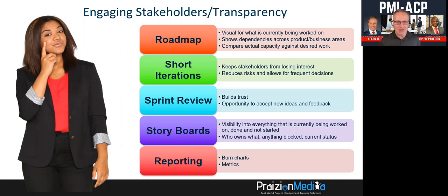Fantastic. And that ties us to the sprint review, which is the demonstration of the output of that short iteration, right? So this is how we can keep our stakeholders engaged, keep them involved in the process. We need their feedback. Here's what you're going to have often, especially in waterfall environments. You're going to have stakeholders that say, I told you my needs, show it to me when it's done. Well, that might be 6 months, right?